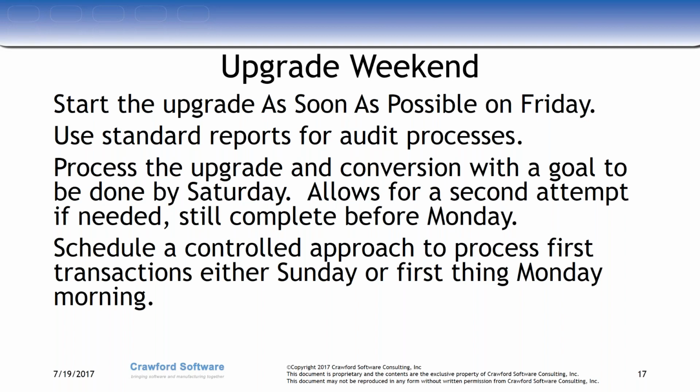The other thing that you want to do, and the reason why we use standard reports, is the secondary audit happens before you apply your customizations and enhancements. Sometimes that application of customizations, enhancements, forms, and everything else can take a few hours, and we want to minimize that time, like I talked about earlier, that if I have a data corruption issue or I had something fall through the cracks, I want to restart as soon as possible. So I'd rather keep those 4 hours for myself if I have to restart. So we always recommend run the audit reports before you apply any customizations, and it becomes a status meeting, it becomes a go, no-go decision for that one.